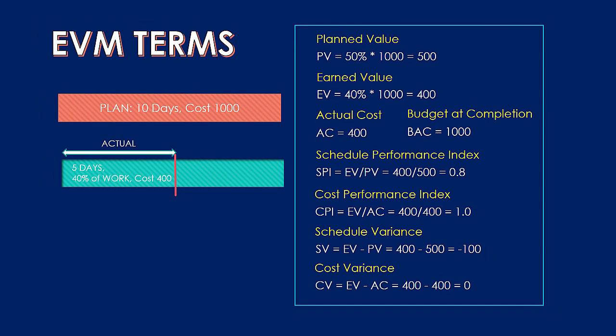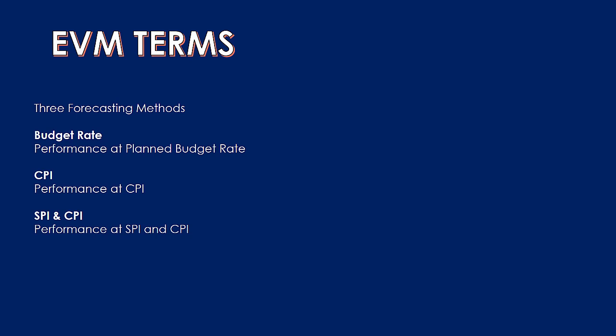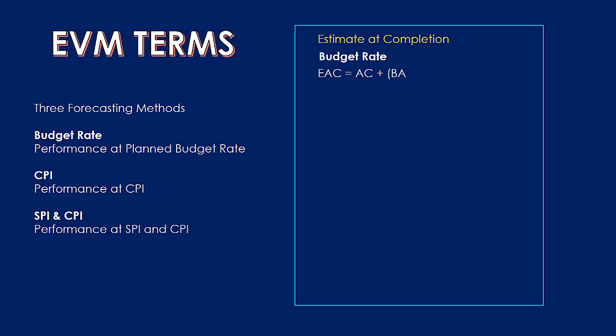An extension of the EVM concept is forecasting. Now that we know how we have performed so far, we can use that information to predict how the rest of the project will go. We will cover three forecasting methods. The first is the budget rate method, which assumes the rest of the project will perform as originally planned. The second is the CPI method, assuming future performance matches our cost performance so far. The third combines SPI and CPI, assuming the rest of the project runs at the efficiency seen in both schedule and cost.